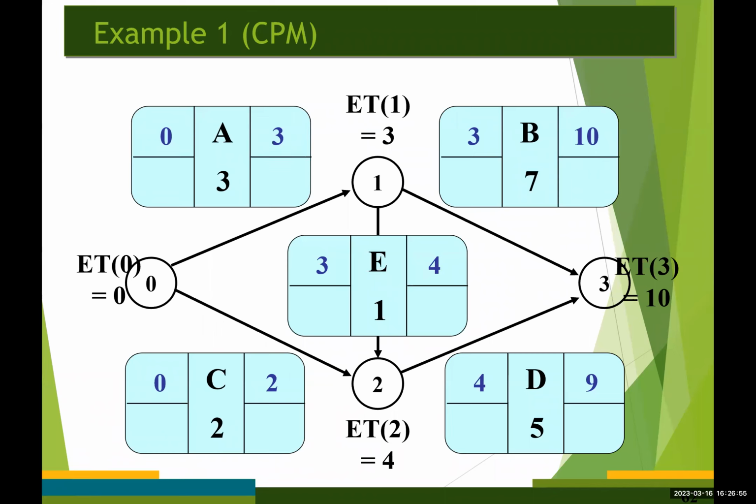To compute the latest time, we begin with the finish node and work backward until we reach the latest time for the start node.